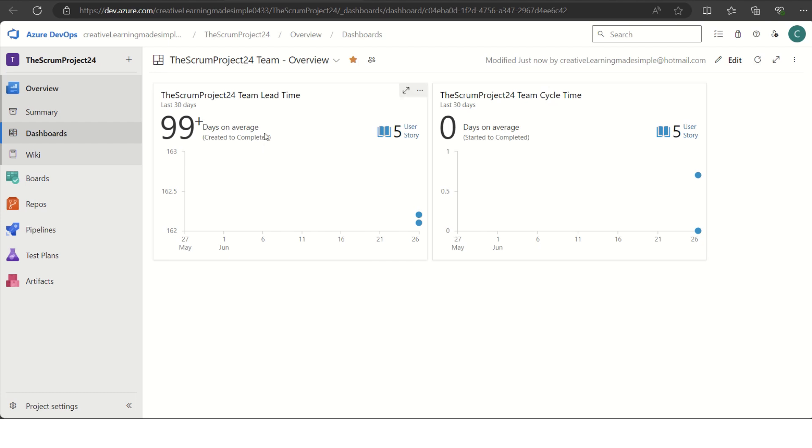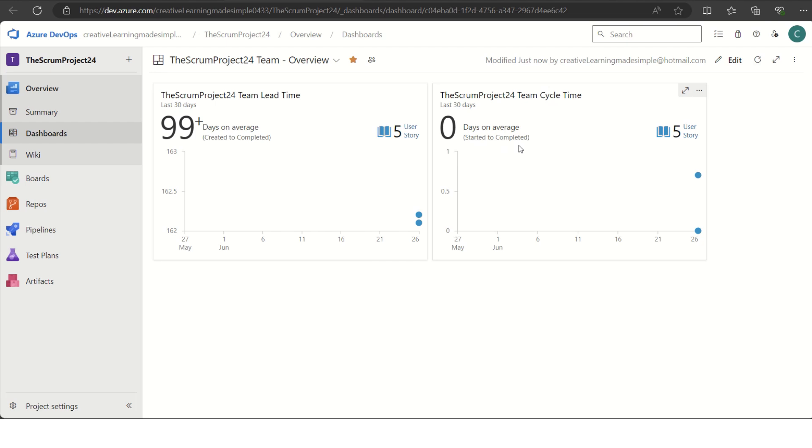What is the lead time? Lead time represents how much time it took from when the work items have been created to the completion. Whereas the cycle time is when the team started working on those items when they were made active till the time of completion. For example, there is a firm which receives a request from the customer. The very first time the request is made, the lead time starts ticking. But when someone truly starts working or fulfilling that particular request, the cycle time starts being accounted.